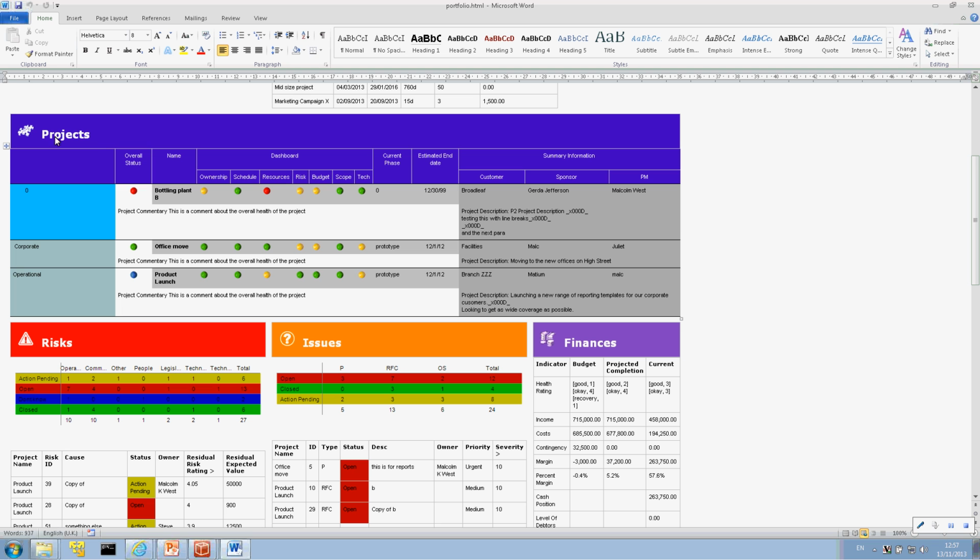And this is using, as I say, append, and what this does is if the header area is the same, then it just appends on each set of content from each project. So not all of these 6 projects have this detailed status reporting. The other 3 might be too small, they might not have started yet, something like that. But these 3 do. So we've merged together that data in the way that the spreadsheet asks for it.